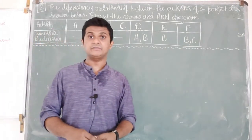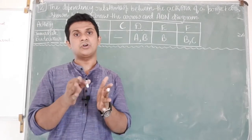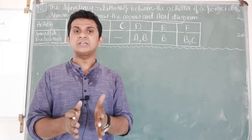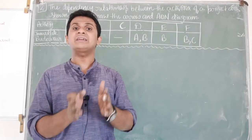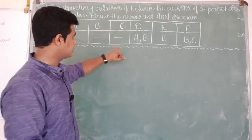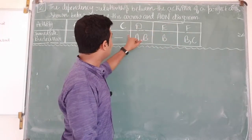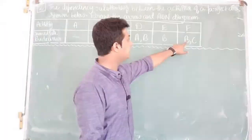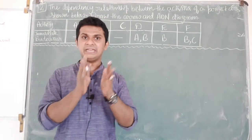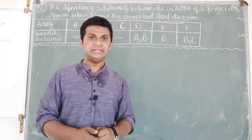The next consideration is the ending activity. Ending activities are those which do not act as a predecessor of any activity. Looking at the question, activities D, E, and F are not immediate predecessors of any activity, which means they are the ending activities. So A, B, and C are our starting activities, and D, E, and F are our ending activities.